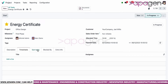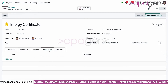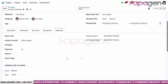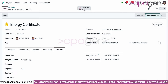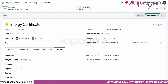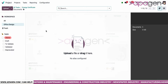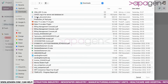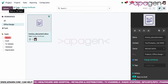The timesheet module entries remain the same, where users can enter their timesheets and hours spent. Subtask capabilities allow you to see all subtasks associated with a task. Blocking will restrict users to enforce predecessor or successor relationships. Additional information adds layers for analytic account sequencing and other important dates. All document associations integrated with the document management system are linked through the document button on the top, along with chatter capabilities where you can attach documents.